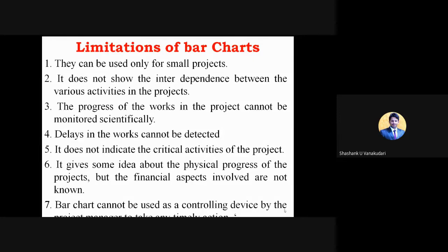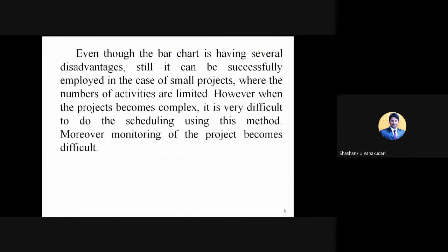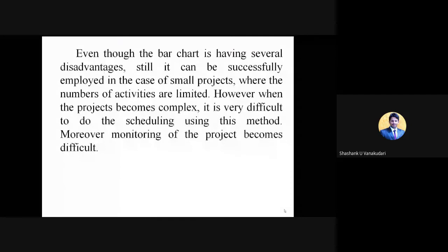And at that time, it is very difficult for the project manager to use this bar chart to monitor each and every activity that will come up in the project. Even though the bar chart has several disadvantages, it can still be successfully employed in the case of small projects. Small projects means when the number of activities is very small. Depending upon the activities, we can call it a small project or a big project, right?